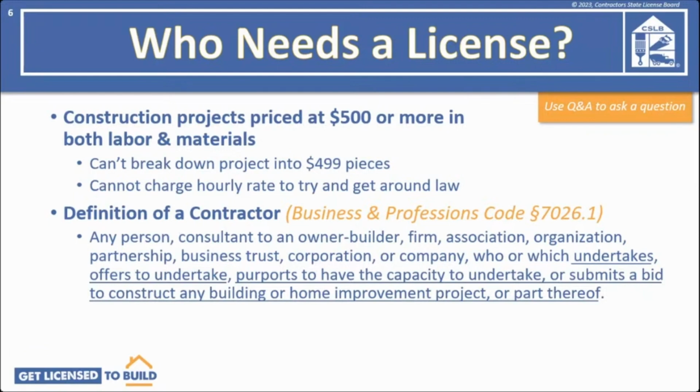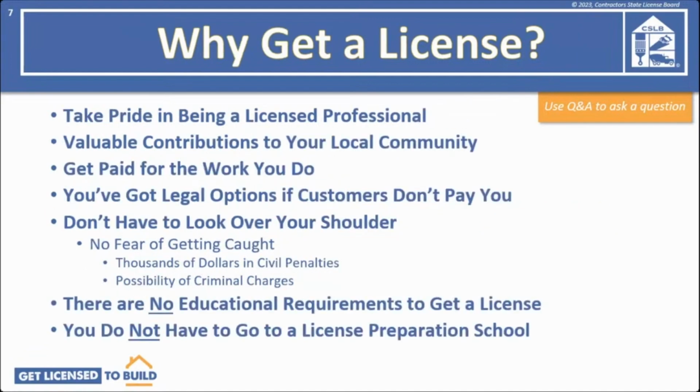In other words, you don't have to do the work to break the law. You must have a contractor's license just to advertise that you can do the construction work, or even to give a bid for a construction job if the bid totals $500 or more.